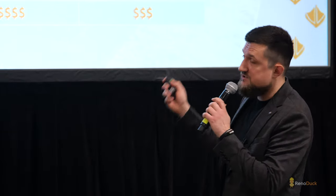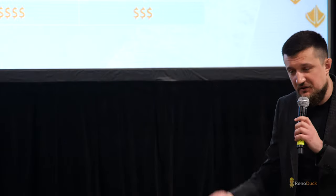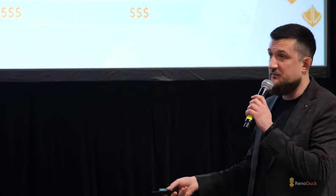But reality says, take a look at your municipal laws and the city bylaws. Chances are you need to pull the permit and understand that. Again, a lot of clients will tell us, well, I probably need to only pull the permit if I'm finishing the basement for rental purposes. Again, no, for personal use, you still need to pull the permit.